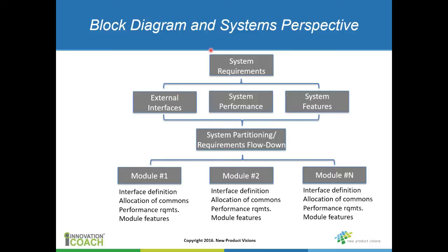You're going to start at the system requirements, but ultimately you've got to get down to the individual module level, how they're going to interact with one another, how you're going to allocate common components across the different modules, and where particular functions are going to occur. So this is a very important activity, and we could spend maybe a whole webinar talking about system architecture issues.